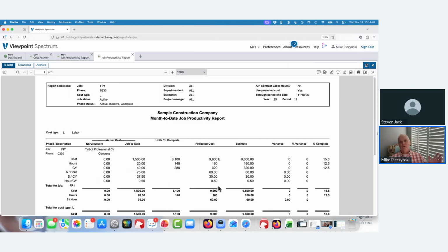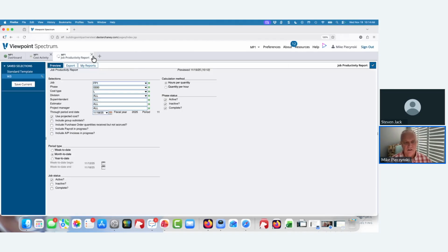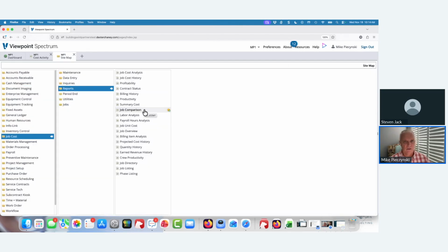So now we back up and we ask questions. What's going on? Do we have new labor contracts that got missed in the estimate? That happens, right? Do we have different crews? There's a reason, and that's what the PM is going to do next, is find out why. And then once the PM gets comfortable, I wanted to let you know really quickly how to adjust this in the projection, the projected cost estimate.